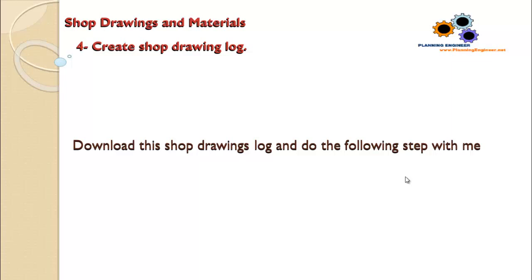Then with coordination of the technical office department, you give them a summary shop drawing log. They start doing details on this and further break it down, dividing each drawing into parts. So let's go and see how to create this shop drawing log and what is the benefit of Primavera dates and how it can help us in this process.